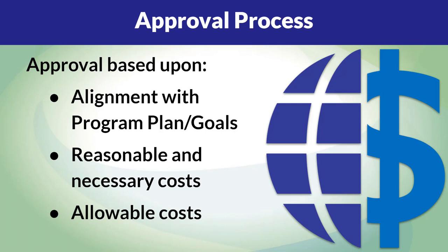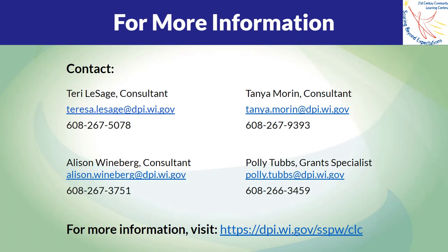Once a CLC consultant approves your budget change request form, it is handed off to the CLC's grants specialist, who conducts a second review for compliance and accuracy. Once the grants specialist approves the budget change request form, you will be notified via email. At this point, any fiscal reimbursement claims you submit to the CLC accountant will be reviewed and processed per this newly approved budget. This micro-webinar on submitting a budget change request form is now complete.